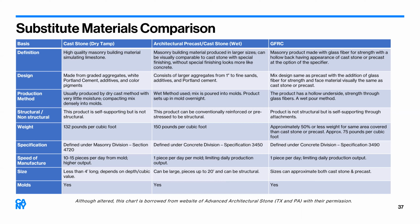Yeah. A question here that's interesting. What are the site logistics from identifying replacement units on a building and executing replacement related to scaffolding and hands-on inspection? It definitely takes a lot. We've had projects where we've done the entire investigation before, especially where you're doing replacement with terracotta, so that you can get the process started right away. And then come back as everything is being produced and start doing the other work. So it is ideal to take that into account when you are looking at a project, whether it be terracotta or any other replacement material, so that you get your hands on all parts of the building right away. Identify these materials to cut through the lead time that these materials could potentially have.